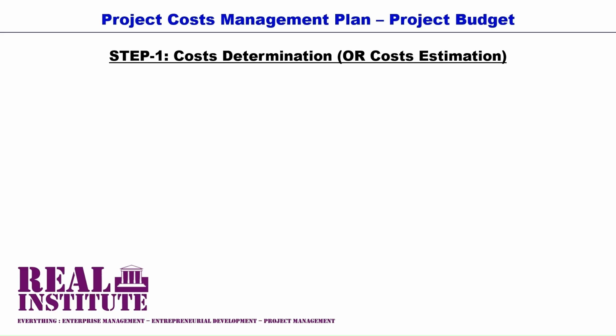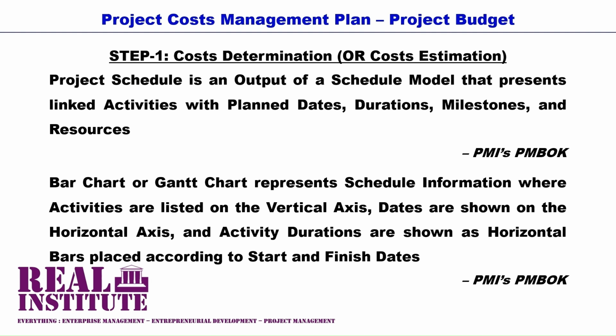Project budgeting begins with the costing of all the individual project activities, while project budgeting, and specifically the costing of project activities, is preceded by having a project schedule in place. It is in the process of developing a project schedule where project activities are determined. It is therefore not possible to compile a project budget without a project schedule. The project schedule should have been developed first before a project budget can be developed.